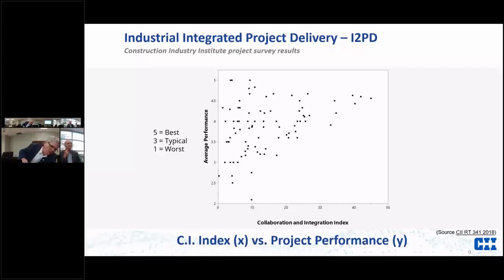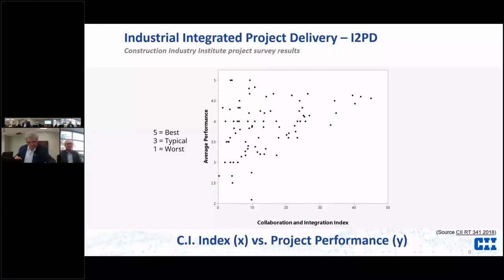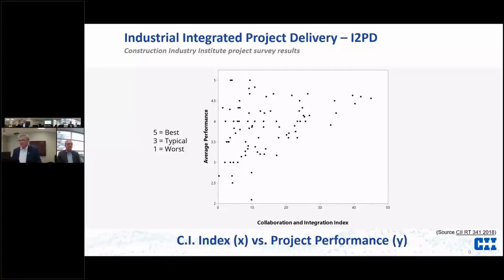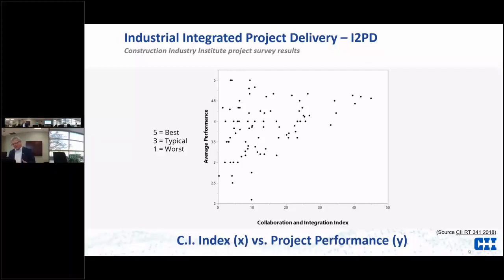We noticed that the bottom right-hand corner was empty — essentially, as the collaboration and integration index increased, the success rates of projects increased. We added simple statistical analysis and saw that the mean performance was 3.8 in terms of project performance for the dataset of 85 projects, and the mean collaboration index across all projects was 14.